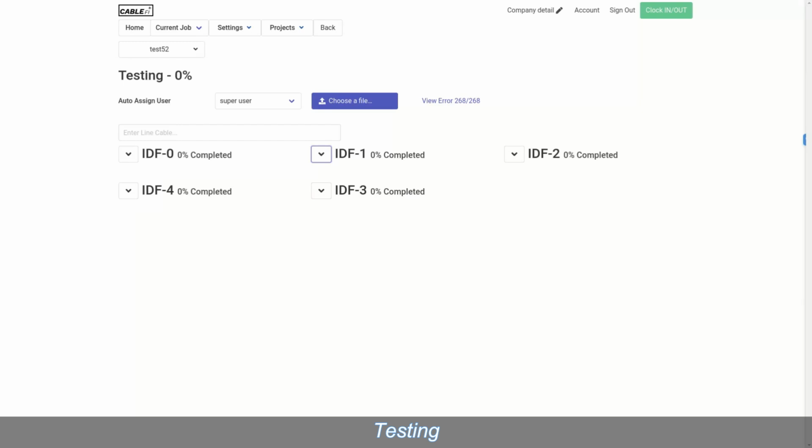And from our experience, a lot of companies don't have a good process for testing. And what usually happens is the guy running the remote end of the tester stops, takes a faceplate apart or a biscuit, re-terminates it, has to reassemble it, and then finally retest it. Now that could take anywhere from 5, 10, 15 minutes per jack. And if you have 20, 30, 40 fails on a project, that adds up to hours of time that you could have been testing. So huge efficiency increase there.